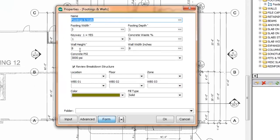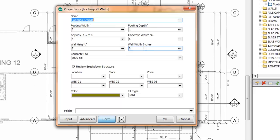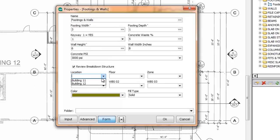The dialog box pops up. You have seen this dialog box before but these are two new questions. Wall height and the wall width. So I can say this is a 6 foot wall and the wall width is 8 inches.